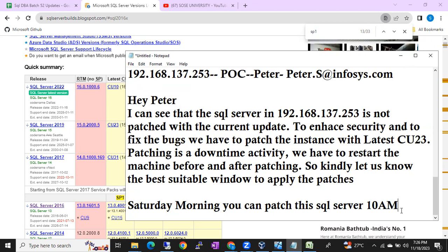But why we take 3 hours downtime means, in case it went wrong, or else you are facing some issues while patching the SQL server, or patching is failing. So to troubleshoot, it will take time, right? So if you take 3 hours and you can complete in 15 to 20 minutes or 30 minutes, it's good only. But if you take 30 minutes or 1 hour and you end up taking 2 hours, 3 hours, then it's not good, right? The patching window is exceeded. You have to answer to a lot of people in the change window, right? So it's a very difficult kind of situation.